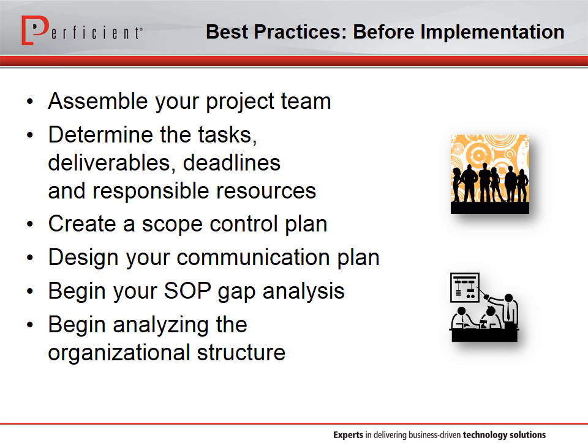Create a scope control plan. It's incredibly easy for the project scope to creep during an implementation, especially a long project, so it's wise to come up with a strategy for handling that ahead of time. With a formal process for requesting, reviewing, and approving scope changes like additional requirements, you can ensure that all of the downstream effects are considered and only business critical changes are allowed.